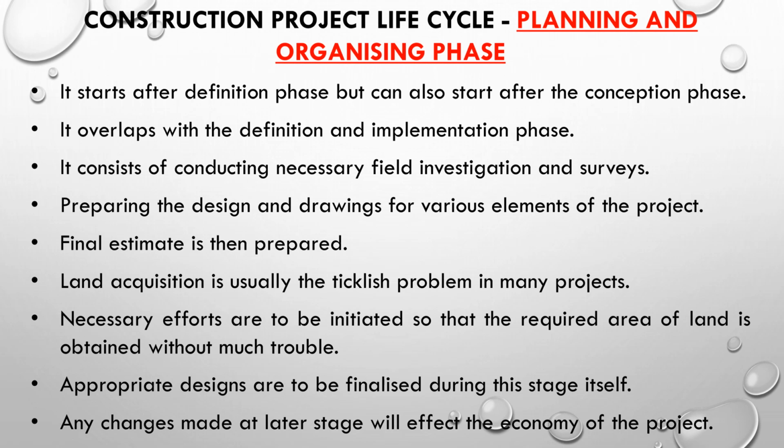conducting necessary field investigations and surveys, preparing the design and drawings for various elements of the project. Final estimate is then prepared. Land acquisition, which is usually the trickiest problem in many projects, so necessary efforts are to be initiated so that the required area of land is obtained without much trouble.